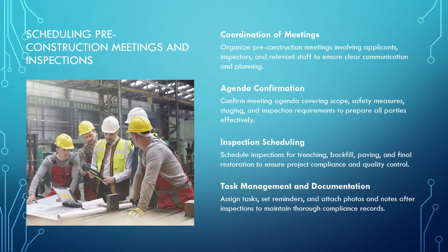Coordinate pre-construction meetings with the applicant, inspector, and relevant staff. Confirm the agenda, including scope, safety measures, staging, and inspection requirements. Schedule inspections for trenching, backfill, paving, and final restoration. Assign tasks, set reminders, and attach photos and notes after each inspection to maintain compliance.